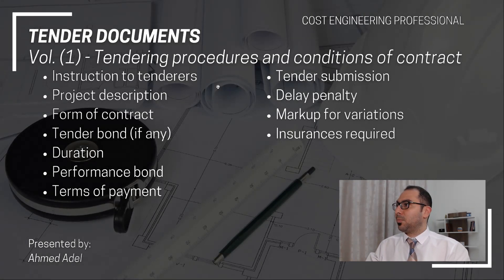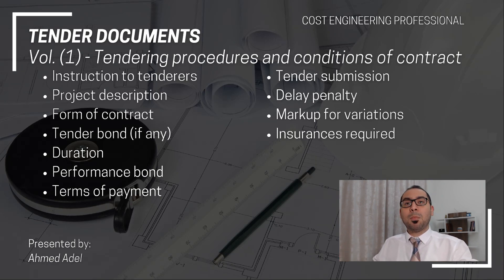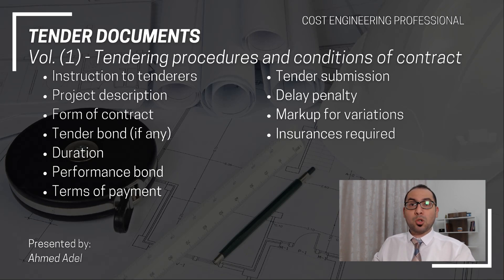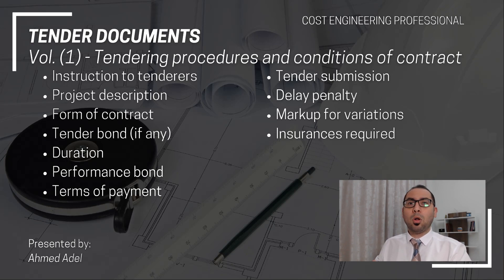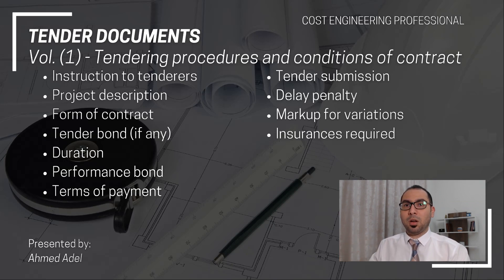Volume one is tendering procedures and conditions of contract. In this volume you will find things such as instructions to tenderers — what to do as a tenderer. A tenderer is the contractor who is pricing this specific project. So as a tenderer, how can you submit your price and what are the instructions the client is giving you to follow in the tender. You can also find the project description — project name, project location, what the project consists of — and the form of contract, including which contract will be used if your offer is selected.